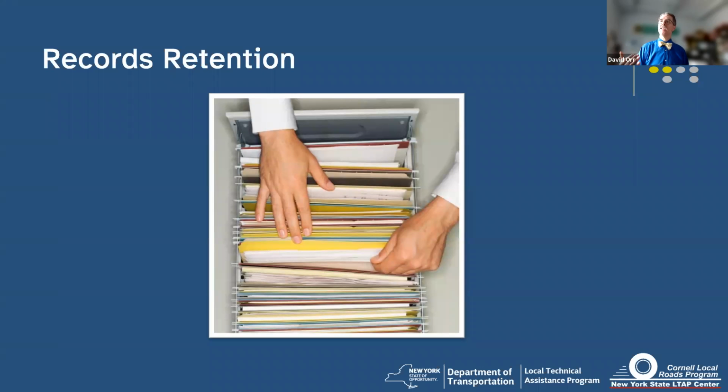General rule of thumb is 3 years after the last action for any paperwork. Okay. 10 years, by the way, if it's on the national highway system. And because of some changes in the law, you may actually need 36 years in the case of some DOT funds because of tax issues. So truth be told, get yourself good records retention